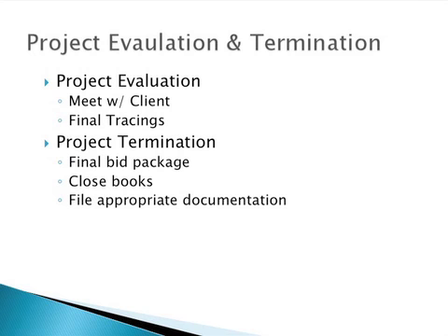Second, in-house, we will close books on the project and wrap up any financial obligations that are still outstanding. Third, appropriate files are then printed and filed accordingly in order to ensure that documentation is kept at the office in case design questions arise when being constructed.